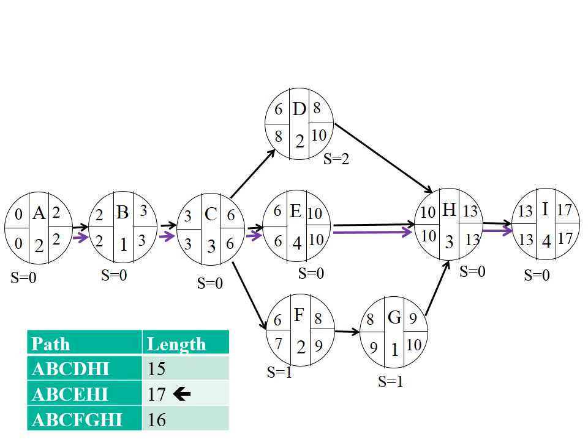Next, we are going to calculate free slack. Free slack is the amount of time by which you can delay an activity and still not affect any other activity. Okay, once again, this is a little bit of a difficult concept. You can delay an activity and not affect any other activity in any which way. So let's look at A. A has no slack, and therefore obviously there's no free slack. B has the same story. There's no slack, so there's obviously no free slack.